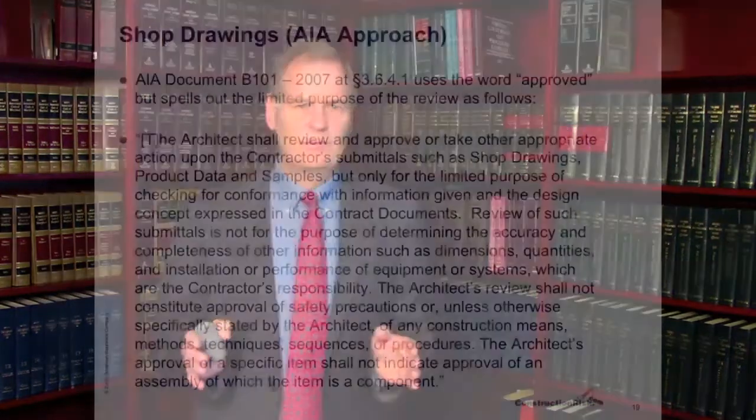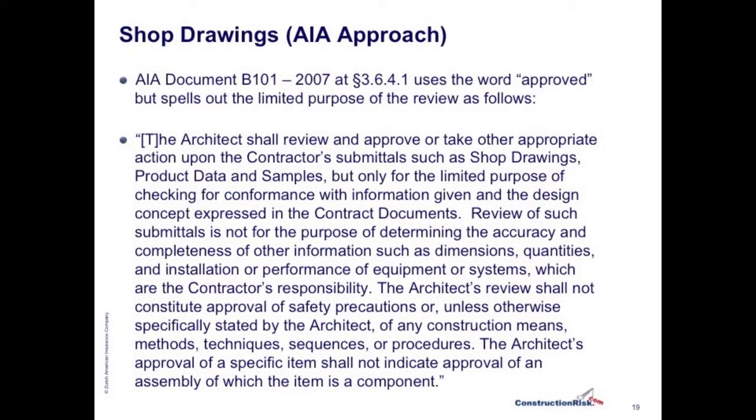The AIA B101 at Article 3.6.4.1 uses the word approved when it deals with shop drawings, but it spells out the very limited purpose that the review has. And it reads as follows, quote, "The architect shall review and approve or take other appropriate action upon the contractor's submittals, such as shop drawings, product data, and samples, but only for the limited purpose of checking for conformance with information given and the design concept expressed in the contract documents.